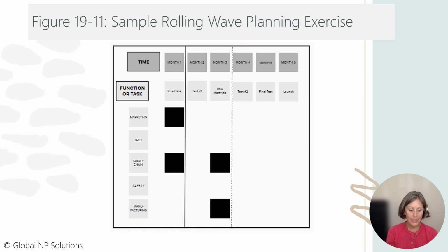Planning poker. Traditional arguments about exact milestone dates and costs can bog down a team during lean product development workshops. Instead of forcing perfection in the schedule or budget, principles of lean encourage good estimates. The chief engineer relies on the expertise of the core team members to accomplish the agreed upon work in the agreed upon timeframes. Combined with rolling wave planning and the burn down chart, planning poker is an appropriate technique to build schedule and budget estimates for a lean product development project.